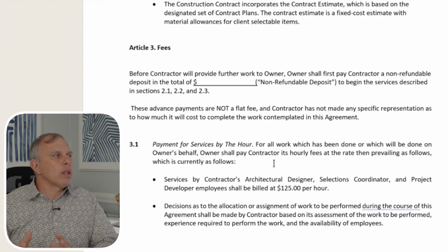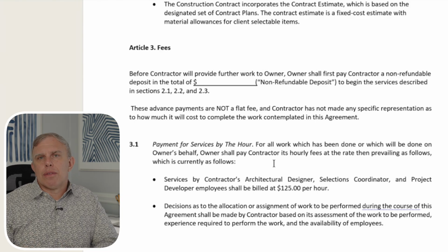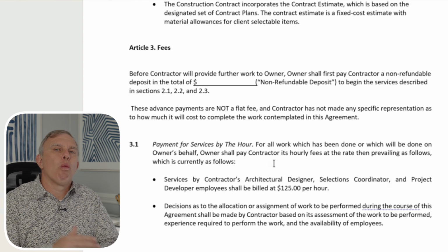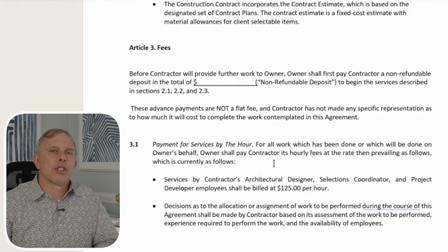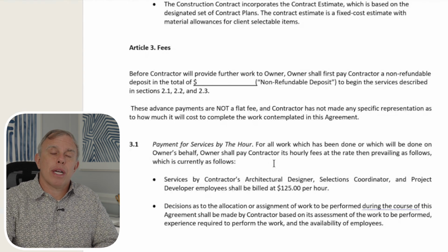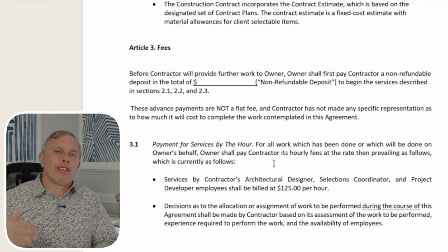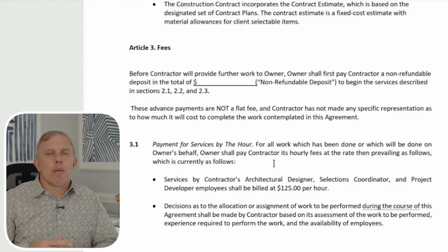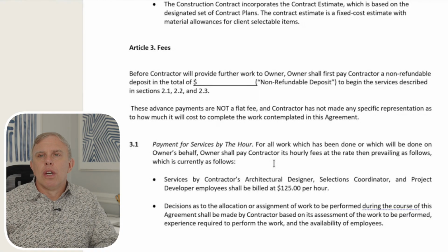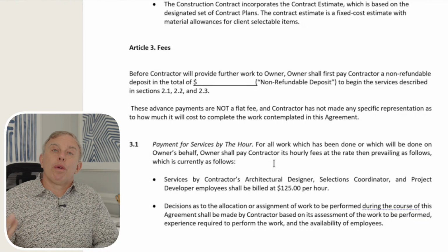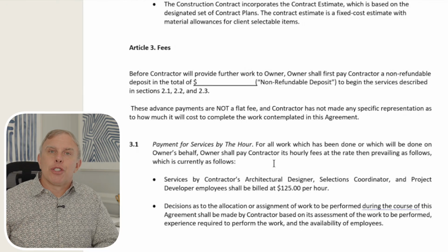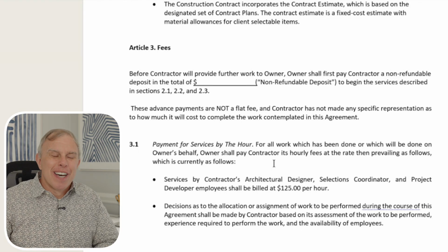So, one of the cool parts about this development agreement, whatever fee we're presenting as part of the development agreement, when you move forward with the construction project and the construction contract, you're going to see that calculated. So if you paid $10,000, let's say, for this, and your project is $100,000, the actual contract number would be $90,000, because we need to do this development work to get your project going anyway.